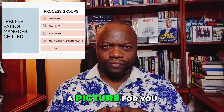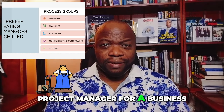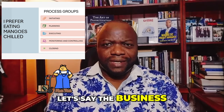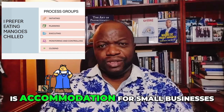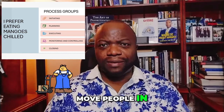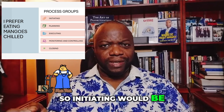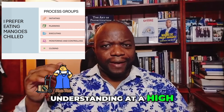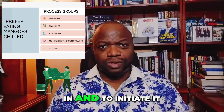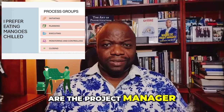Now let me paint a picture for you. Assume you are a project manager for a business to move people in. Let's say the business is accommodation for small businesses. You're the project manager. Your job is to move people in. Well, every move is a project. So initiating would be understanding at a high level what the project entails. It entails moving people in. And to initiate it, there could be a charter that states you are the project manager and states the project at a high level.